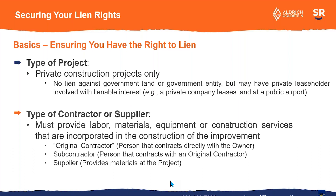Sometimes people overlook that even if a project is on government land — think of a hotel built on public land at an airport facility — but the hotel is actually privately owned, you may be able to lien that hotel or the interest that the private owner has in that property. So don't overlook that. All is not lost if you are working on a hotel or a port facility — there may be an interest that is lienable. The lien laws refer to an original contractor as the person that contracts directly with the owner, the subcontractor as the person that contracts with an original contractor, and the supplier who provides materials actually incorporated into the project. All of those people may have lien rights.